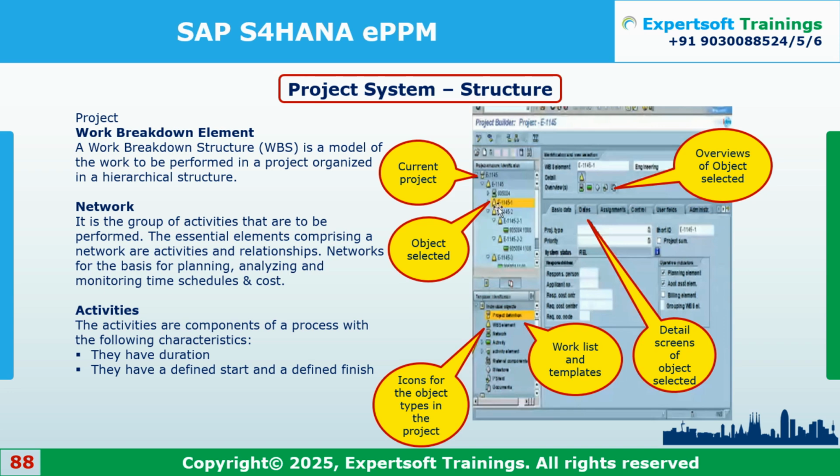So like this, master data and everything will get created. After that master data, you start the business activities. Every department, suppose the project department, will check each and everything. Then they will release this. Once you release, only then can you start the further activities, meaning the subsequent departments have to start.